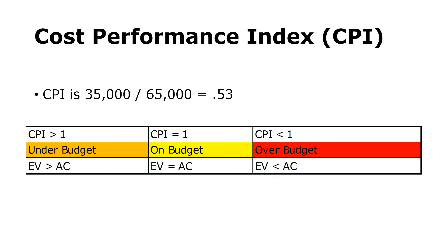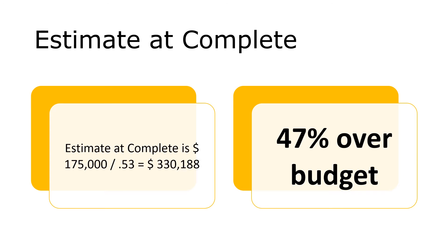The CPI, or Cost Performance Index, gives a measure of efficiency. It shows how efficiently you are actually spending your budget dollars compared to how efficiently you planned to spend them. It is calculated by dividing earned value by actual cost. In our example, CPI = $35K divided by $65K = 0.53. A CPI of 1 indicates you are spending your budget to accomplish work at the rate you planned. A CPI less than 1 means you are over budget — you are spending your budget less efficiently than planned. The Estimate at Complete is the forecast of the total amount needed to complete the planned work, based on actual work completed. The easiest calculation is to divide the total budget by the Cost Performance Index.